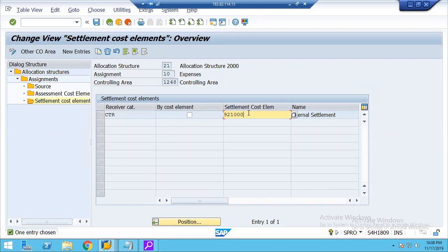Suppose the business wants to consider the construction as one building, one project. Within the project they may have multiple WBS elements. For the foundation, they will consider one WBS. Then the pillar part and roof part is considered another WBS.